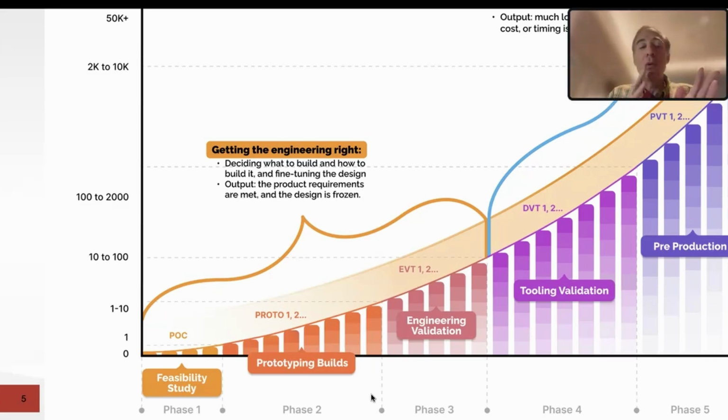Once you do that, obviously you selected some of the key components, you start to build an initial engineering BOM, bill of material, which is the list of materials that make up the product. At this stage, based on unknowns and assumptions and risks, it's good to start to put together a rough proof of concept prototype. Maybe very rough, partly functional, maybe not even that, but you really basically want to use it to address your assumptions and identified risks.